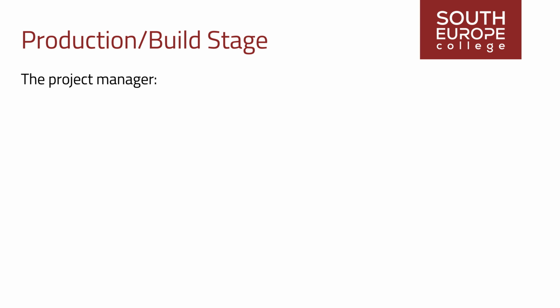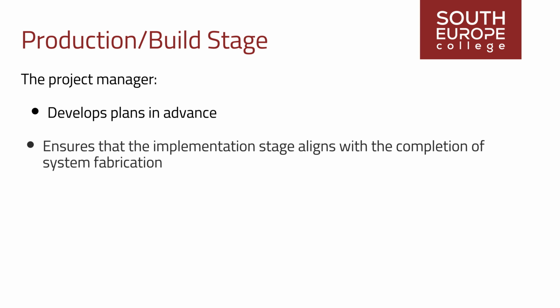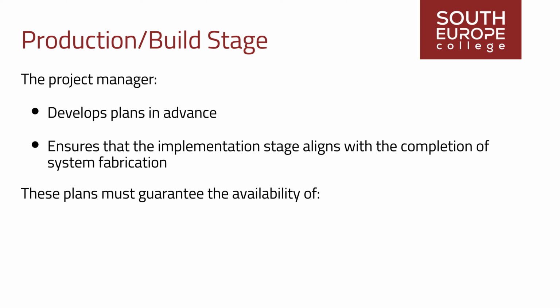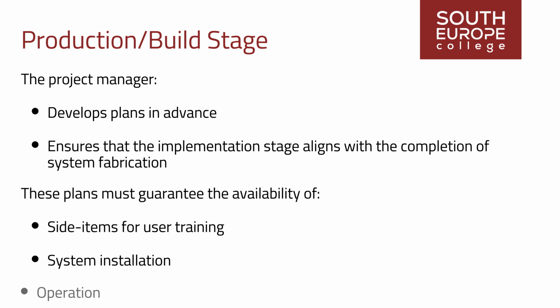The project manager shoulders the responsibility of developing plans in advance, ensuring that the implementation stage aligns with or precedes the completion of system fabrication. These plans must guarantee the timely availability of necessary side items for user training, system installation, and operation. Commencing early in the project, ideally during the definition phase, planning for implementation should be substantially completed by the conclusion of the production build stage.